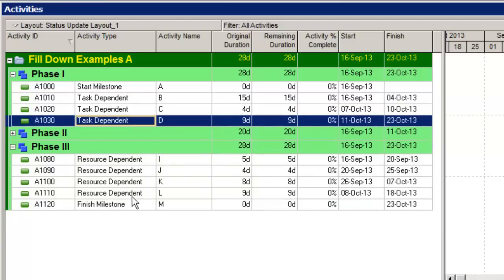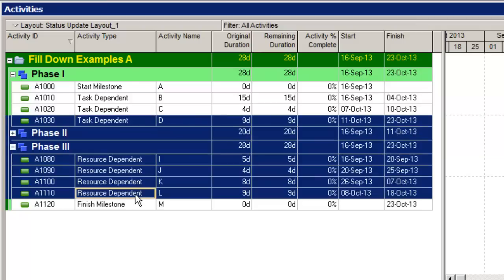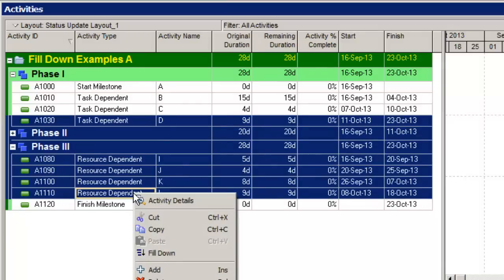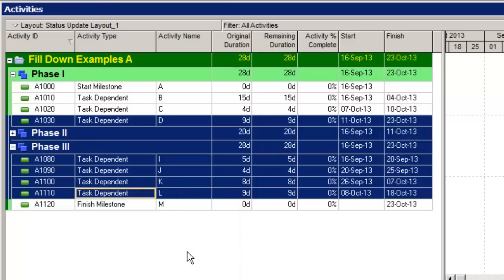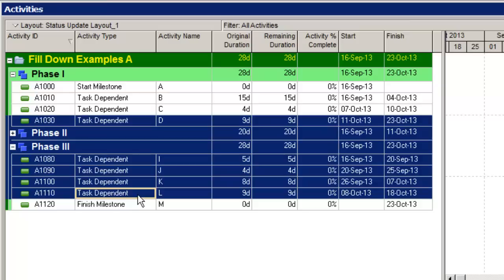Now I can hold down the shift key once again, select activity L there at the bottom, and then right-click and do a fill down. Just another tip: when you're doing fill downs, make sure you're careful about where this yellow box is. That's the column that's got focus—that's the column that will get filled down.